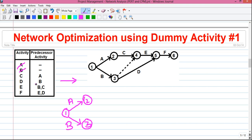So activity A and B are done. Next, activity C. So C's predecessor activity is A. So C will start from the point or from the event where the activity A is finished. So activity A is finished at event 2, so we will draw C from event 2.